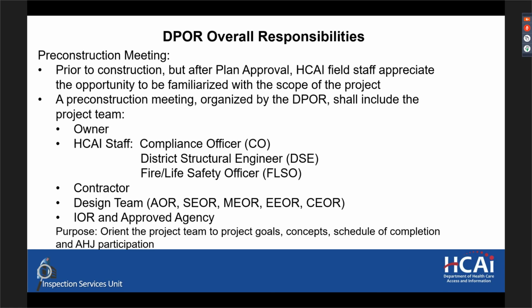So a pre-construction meeting is considered a best practice for any project. We suggest that every project with a contract sum greater than $5 million does have a pre-construction meeting in order to better align the project goals with inspection requirements, contracting requirements, and field staff availability.